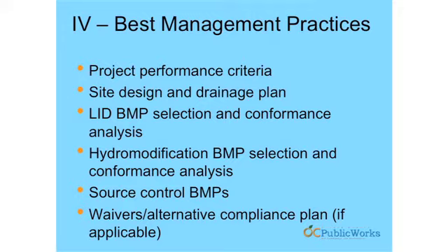In reality, if you know hydromod applies, and you know that you're probably going to be 2 to 4 times larger on hydromod, then I would start with hydromod, and they're probably going to start with hydromod as their controlling aspect of BMP sizing and site design, and then they're going to come back and check to make sure that the LID criteria are met via the hydromod design that they've provided. And so this section could take a whole number of forms, depending on which conditions apply, which criteria apply to the project, what soil types are, and which type of sizing standard controls the overall design of the project.